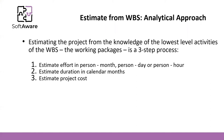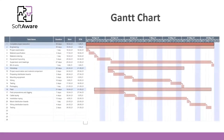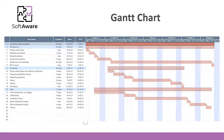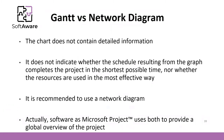Let's start with some concepts about what is a Gantt chart and the network diagram. This is a Gantt chart — as you can see, we have the tasks, an estimation for each task, some connections between those tasks, and we can see the time. But what is a network diagram? A network diagram is more complete than a Gantt chart because a Gantt chart does not contain all the detailed information, does not indicate whether the schedule completes the project in the shortest possible time, nor whether the resources are used in the most effective way. It is recommended to use a network diagram.